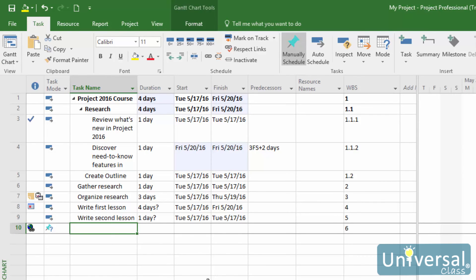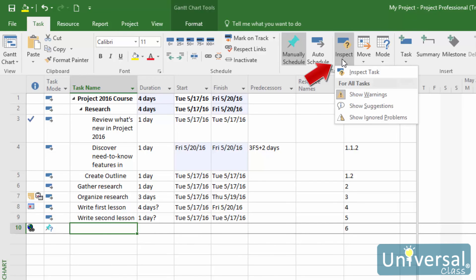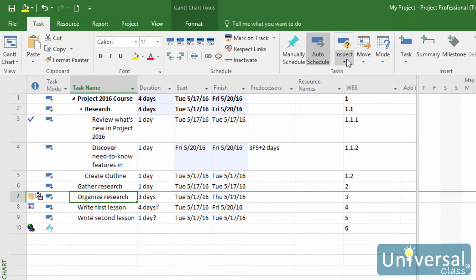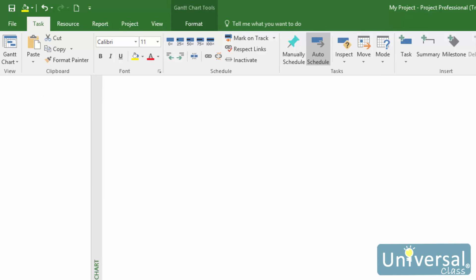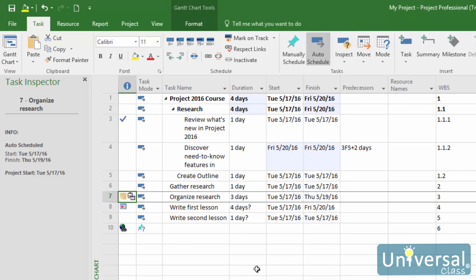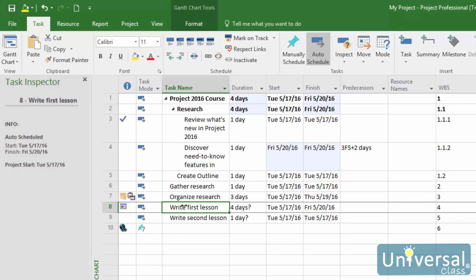To view the Task Inspector information, go to the Task tab, then click the drop-down arrow beside the Inspect button. Select the task you want to inspect, then click the drop-down under the Inspect button and choose Inspect Task. The Task Inspector opens on the left side of the window for the selected task. With the Task Inspector open, you can click on other tasks to inspect them. Whereas the Task Inspector lets you see task drivers in a table format, Task Path will show you task drivers by highlighting them in the Gantt chart.